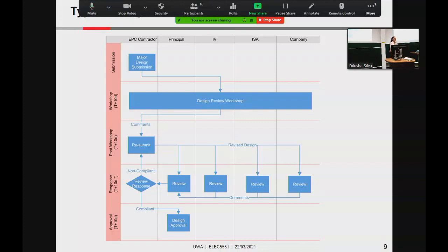What happens is, even if it's a massive company, let's say Chevron or Rio Tinto, they don't have enough manpower or brain power to manage every aspect of a design. There are thousands and thousands of drawings. They don't have as many resources to check them and ensure they comply. They are even, the designs we're selling them are even legal to build in Australia. So what they do is they hire another company. They are usually called, say, design delivery authority or principal.